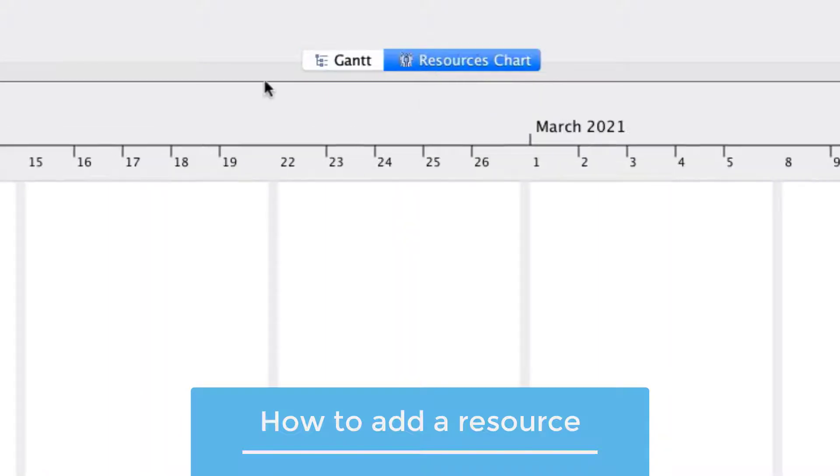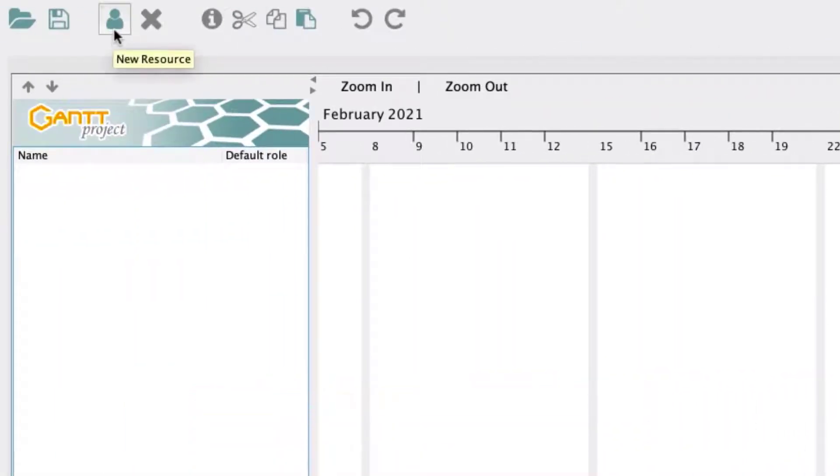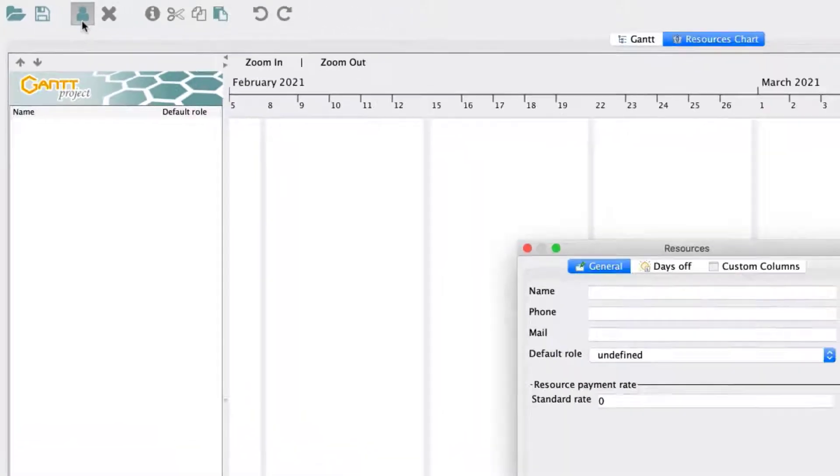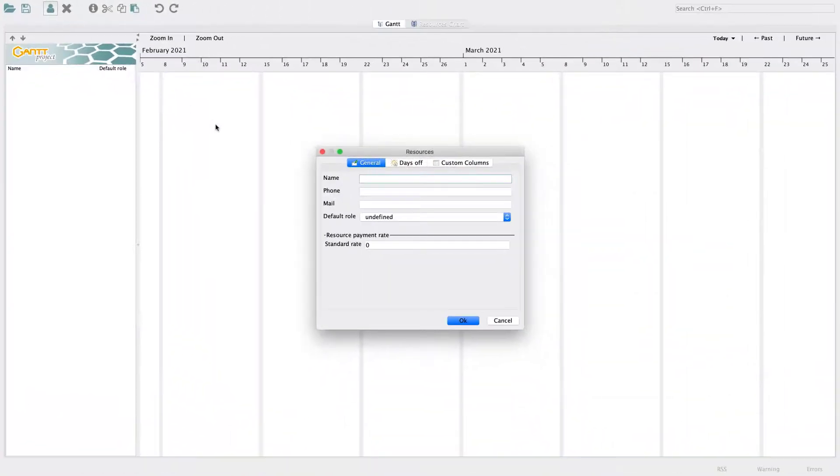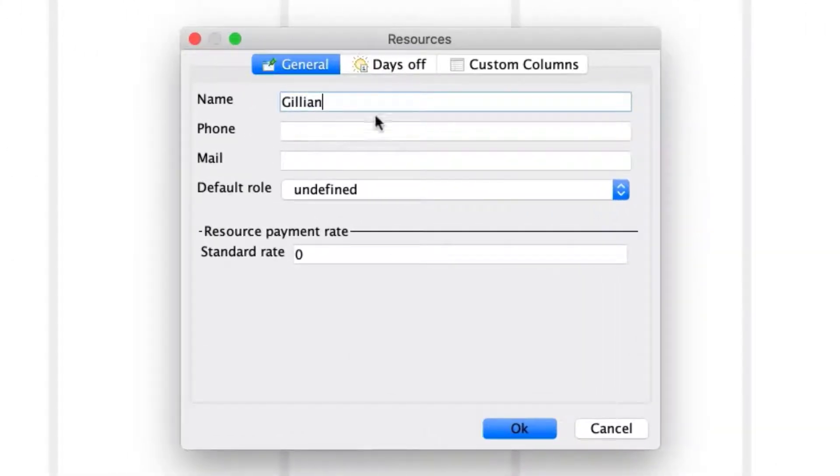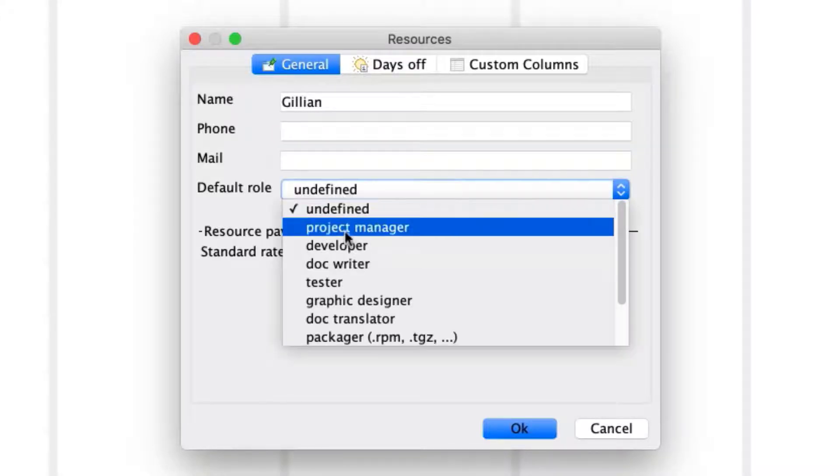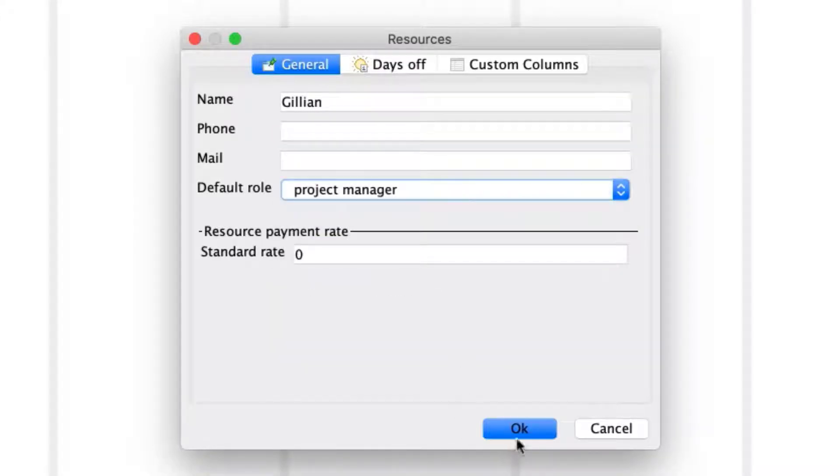Click on the Resources tab. On the menu bar in the Resources tab, select the icon depicting a person to add a new resource. A pop-up menu appears, and you can add your name in the designated field and select a role for yourself. For now, type your name and select Project Manager and press OK.